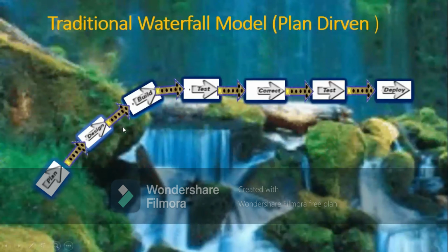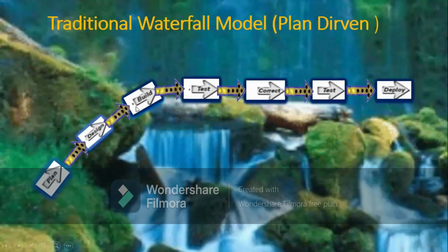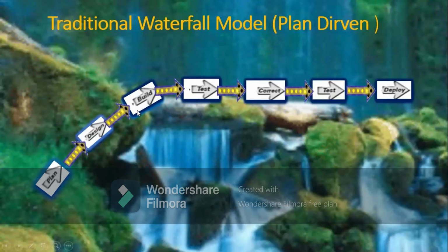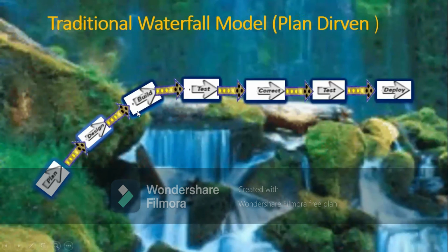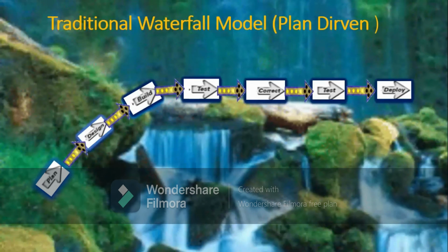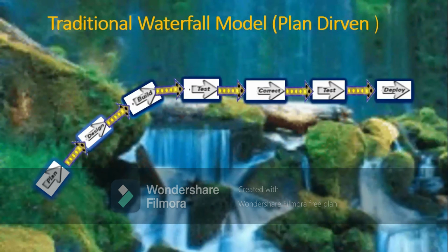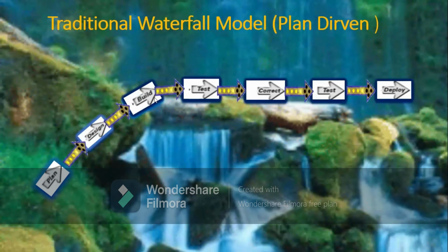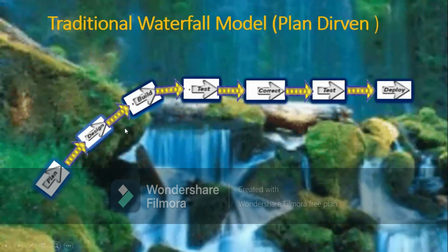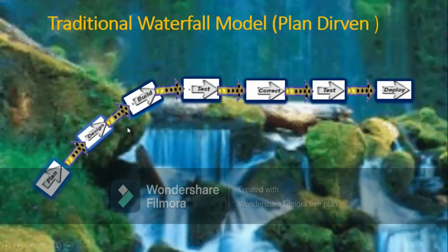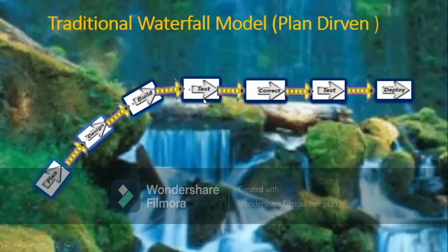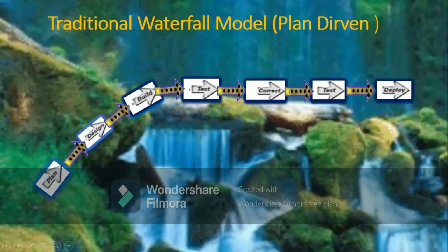So, considering if the customer came and said, well, I need to change the design, you will say to him, well, it needs to go to the change request form, and then we will evaluate. Then you negotiate with the customer for the price and the time, and then you have to start looking at how we're going to change it, if it's in the software, in your database, on your design, and on how it's going to reflect onto the application.